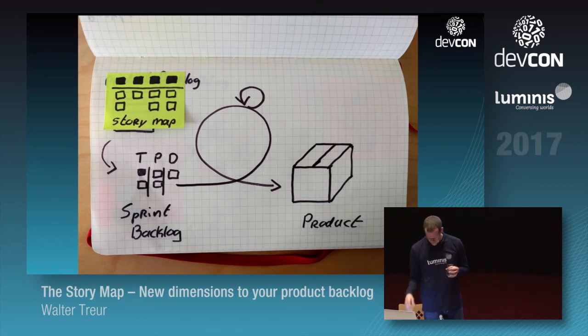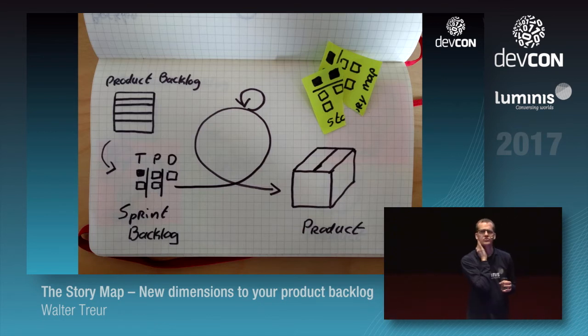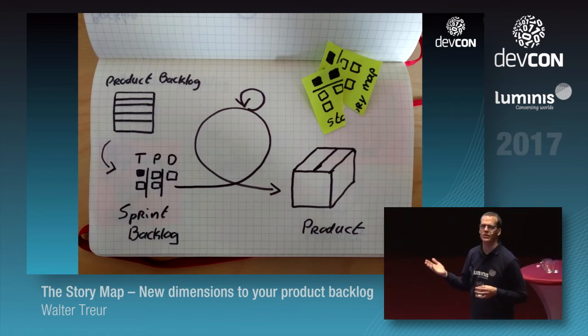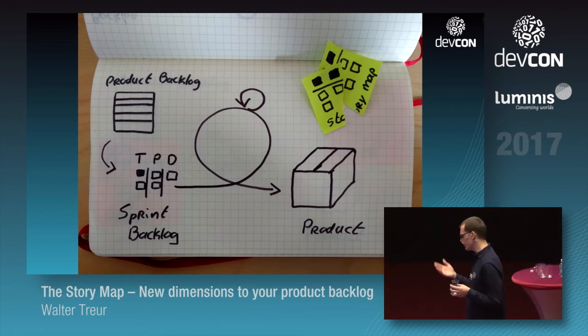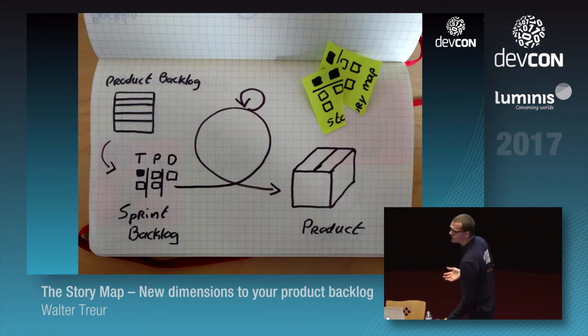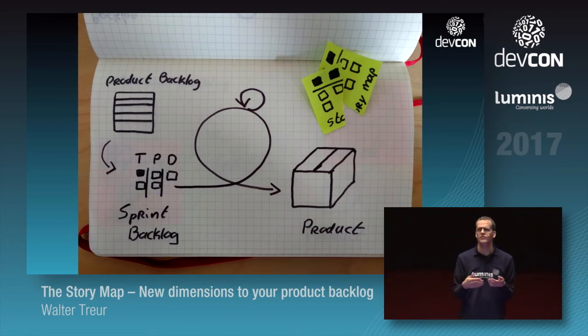The one thing that you don't want to do is get rid of it once you start working on it. Obviously, this is not set in stone. If you build your user story map and then you're going to move everything to your product backlog, you're going to lose the insight in your user that's taking these particular steps, and you're going to lose the benefit of determining what your next release is going to be.